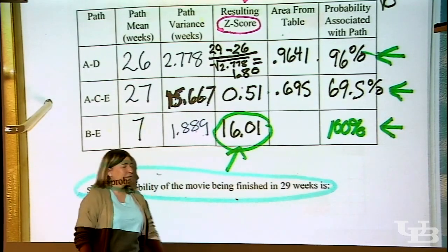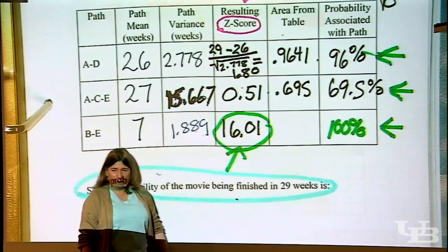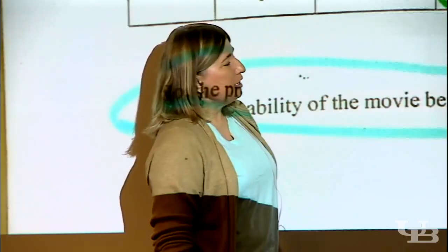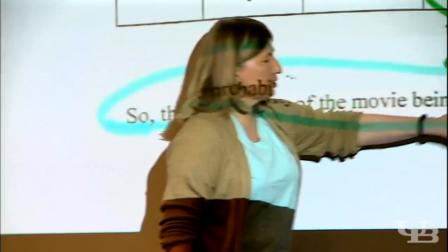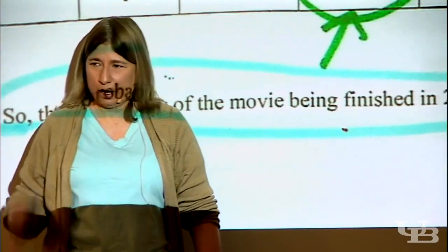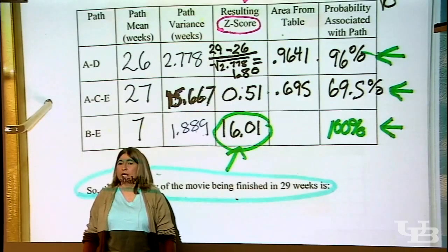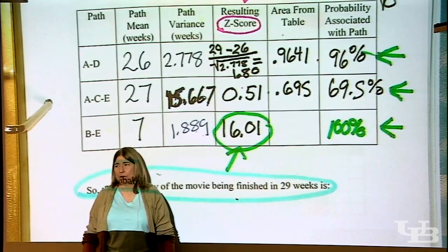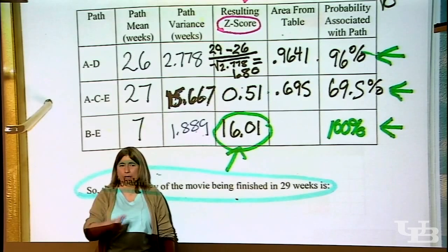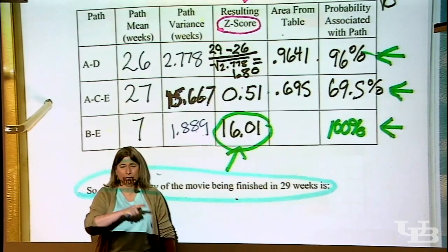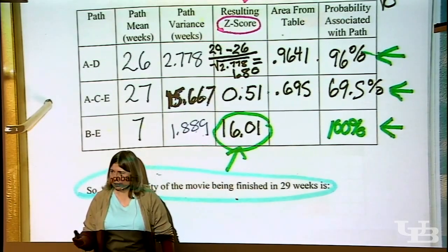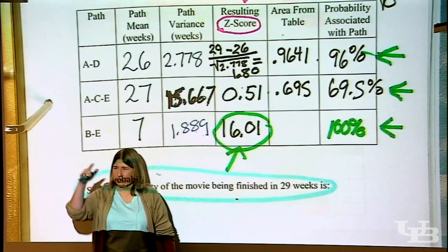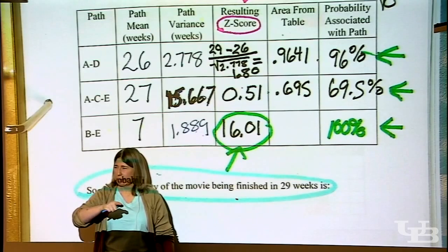Oh, we have to remember one other principle from PERT analysis. The belief that the risk associated with finishing the project by a deadline is the joint probability of completing all its paths by that deadline. Joint probability. Wait a minute, what was joint probability? There's these 3 different things. They each have a probability.